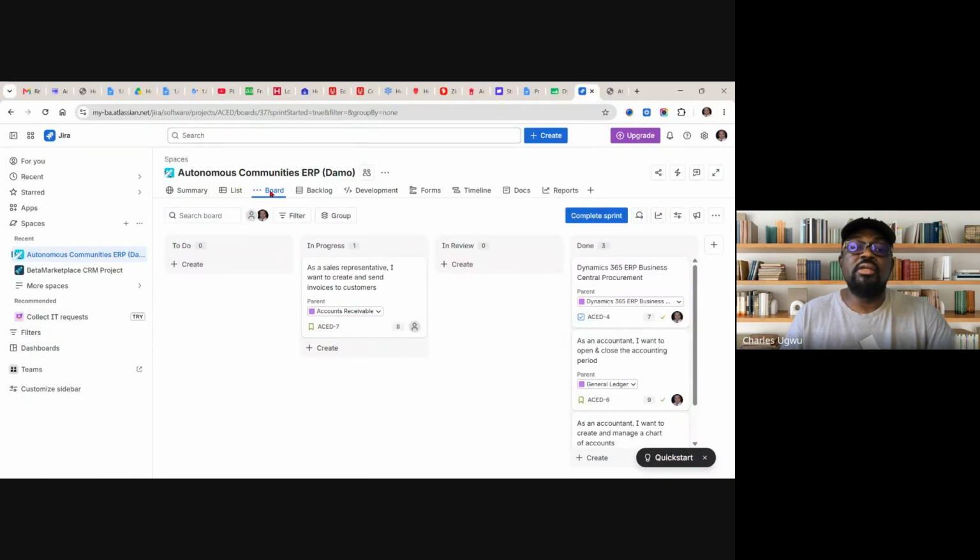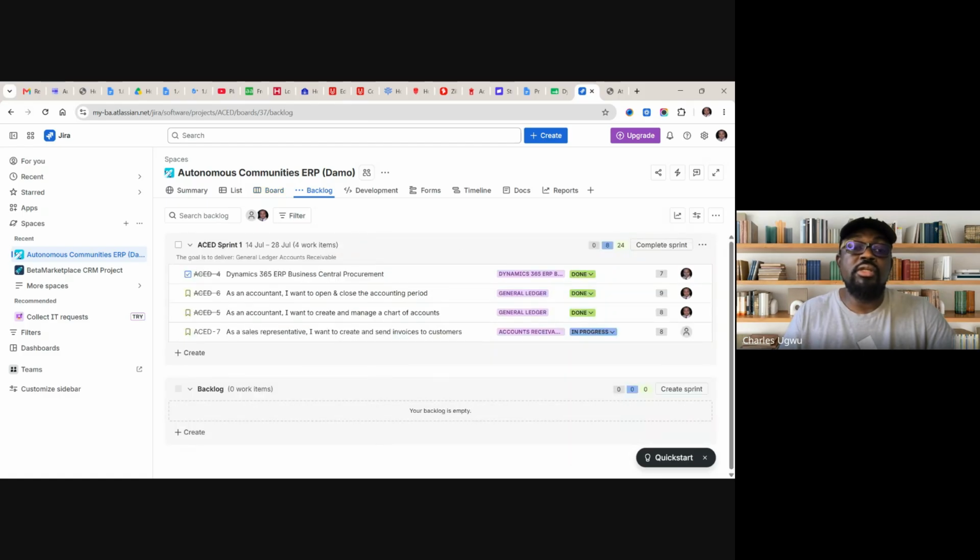Let's see, we come to backlog here, and you see we've done every other thing. You see the others are marked. So this particular one, you see everything done. This work is in progress, but we can't continue because the 2 weeks is here and we can't finish this work. That's why I'm saying it's always good to understand your capacity so you don't have leftovers. You don't have to be taking work back.